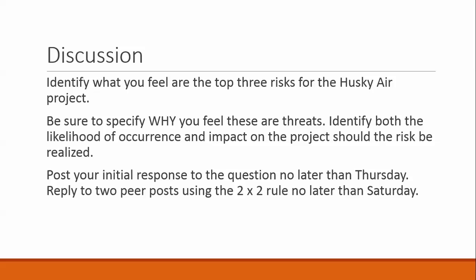We really want to focus our risk attention on those risks that will have the highest impact and the highest likelihood of occurring, because those are the ones that we really probably should plan on and be prepared for. Most likely it's going to happen. And if it happens, it could be a big impact on the project. So as risk managers, we spend our time there. We probably will not spend as much time focusing on things that have a low likelihood of occurring and will have a very low impact on the project as a result.